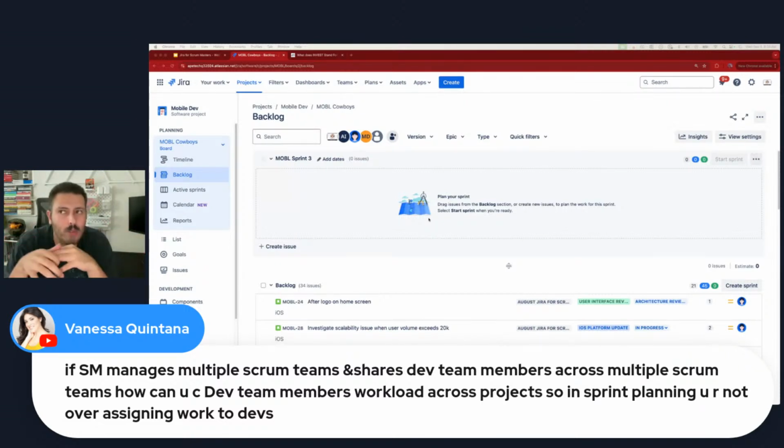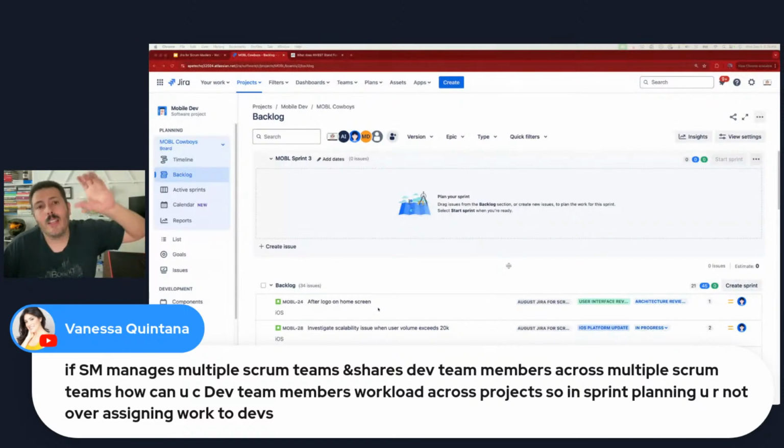Because when you're product driven or project driven, right, you run the risk of having your resources shared across. Now, Jira is not a traditional waterfall or just a traditional project management tool. So Jira doesn't know how each team member is being reallocated across different projects, right? So it's not a capability in Jira. Jira will tell me in here, when I plan my sprint in a second, it will show me for this sprint and for this project the capacity of that individual.